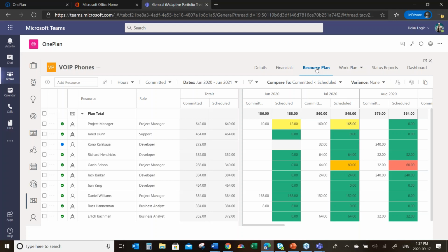So the schedule, either because some tasks got delayed or some tasks are running long, has a commitment there that exceeds our original commitment. That's going to be an impact not only to this project potentially, but across the whole resource pool, because people were expecting 64 hours, and the remaining hours were available to other work. Now that's not necessarily the case. So it gives the PM visibility that we're running hot on some of these resources, things aren't lining up to where we thought they would be, and we need to take some corrective action.